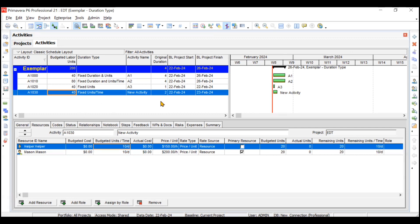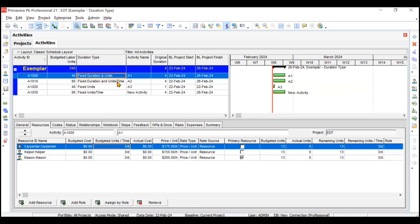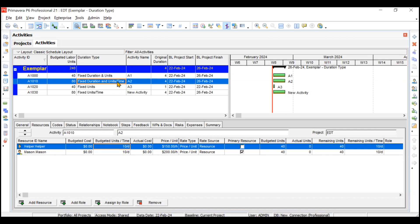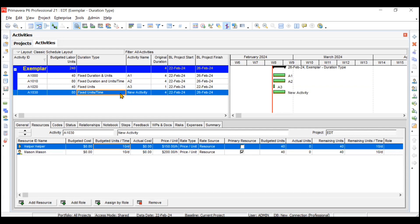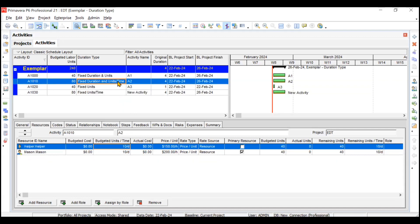Similarly for Fixed Units per Time activity, if I change the budgeted units from 40 to 80, then the duration should change from 2 to 4 — and yes, it does. So this is the concept of duration types. For Fixed Duration and Units and Fixed Duration and Units per Time, resources will not interfere much. But for Fixed Units and Fixed Units per Time, resources change a lot — your duration gets affected. So these last two types are resource-driven, while the first two are not resource-driven. That's all for the video, thank you everyone.